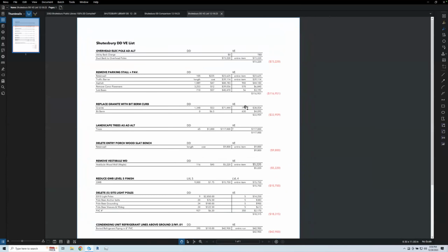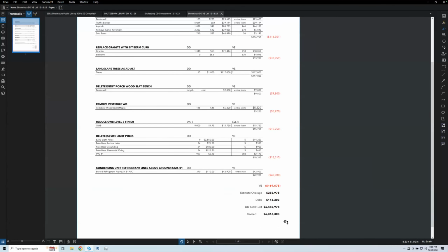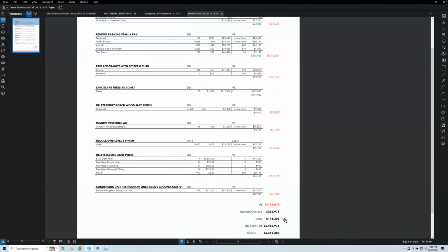We also have not done a thorough review of what it's going to totally cost us after the MBLC. Right, because we raised $75,000 and that's like $300,000. But then we have to remember landscaping and paving are not eligible costs. So we need to know total project costs and then what's eligible and what's not eligible, to know what our costs are. And then we need to know how much money we have, and then how close we are to on budget.